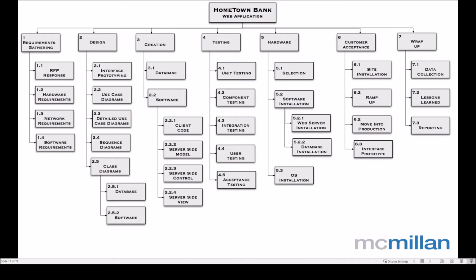So that top line, 1, 2, 3, 4, 5, 6, 7, the key activities or deliverables. We could actually put those in deliverable statements. So we're going to have some type of document for number 1 that outlines the requirements of the project. We might call it the project requirement report, a number 1 deliverable. And it's good to talk in terms of deliverables because it makes it tangible and pragmatic. It objectifies that statement and makes it far more objective.